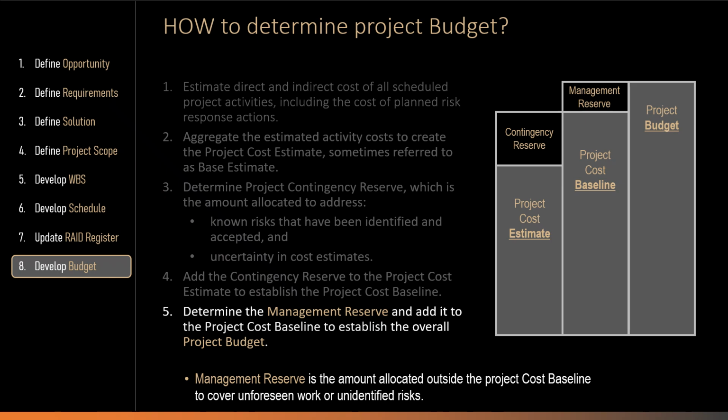If a situation arises that justifies the use of management reserve funds, the project change control process must be followed to obtain project owner approval to transfer the required amount from the management reserve into the project cost baseline.